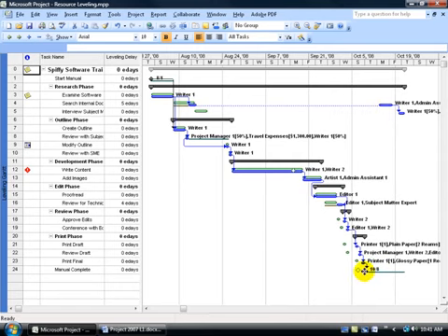Now because of all these delays and splitting the task especially, the project's end date is going to be delayed. You can see that originally when you hover over it, that it went out a couple of days from here, but notice that this task up at the top, because of the split, pushes it out even further. So originally without the split task, you would say, oh, it's been delayed, as you recall from hovering over the green little diamond here, the pre-level, October the 6th. And then it goes to the October the 8th, but because this task has been split and it's pushed out,